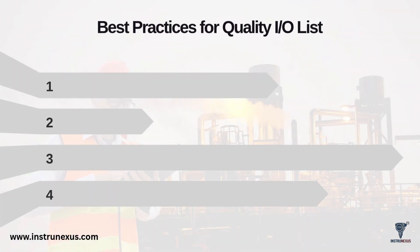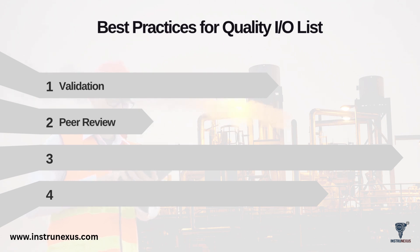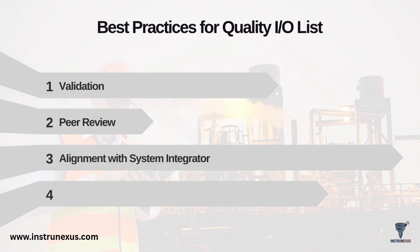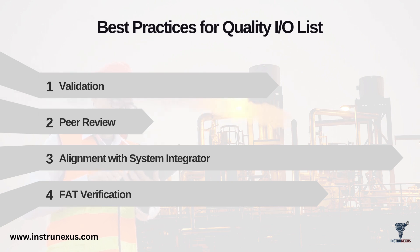How do we guarantee a high-quality, error-free IO List? By following a strict multi-step quality process. Step one is validation: the engineer validates the list against all input documents – the P&IDs, the instrument index, the control narratives. Step two is peer review: a colleague or senior engineer reviews it, as a fresh set of eyes is invaluable for catching small mistakes. Step three is alignment with the system integrator: a formal review with the DCS or PLC vendor, who checks the list against their hardware standards and addressing philosophy. Step four is FAT verification – the final and most important test. During the factory acceptance test, you use the IO List as a script to physically test every single point, proving that the as-built system matches the as-designed document.